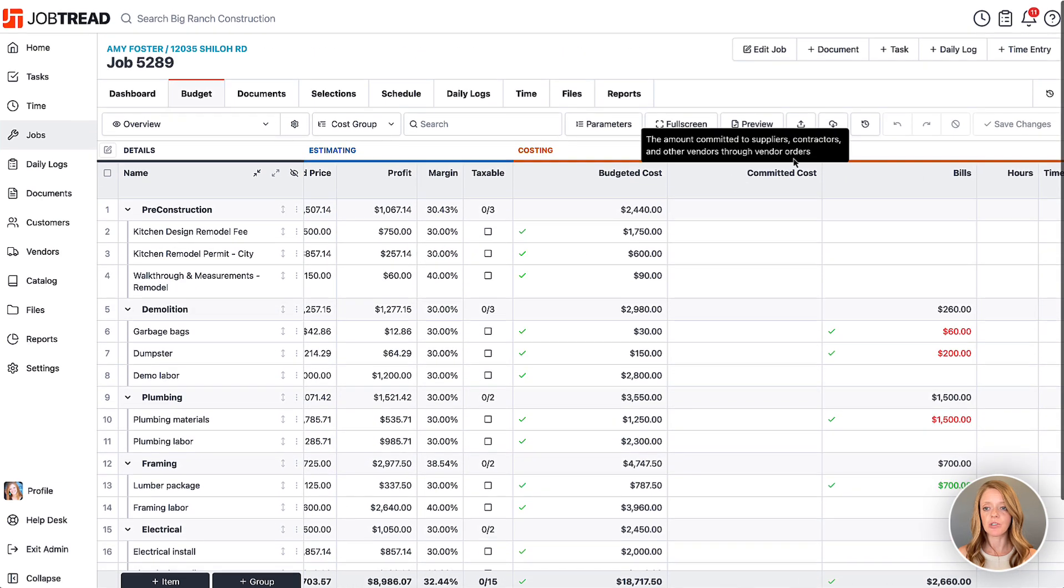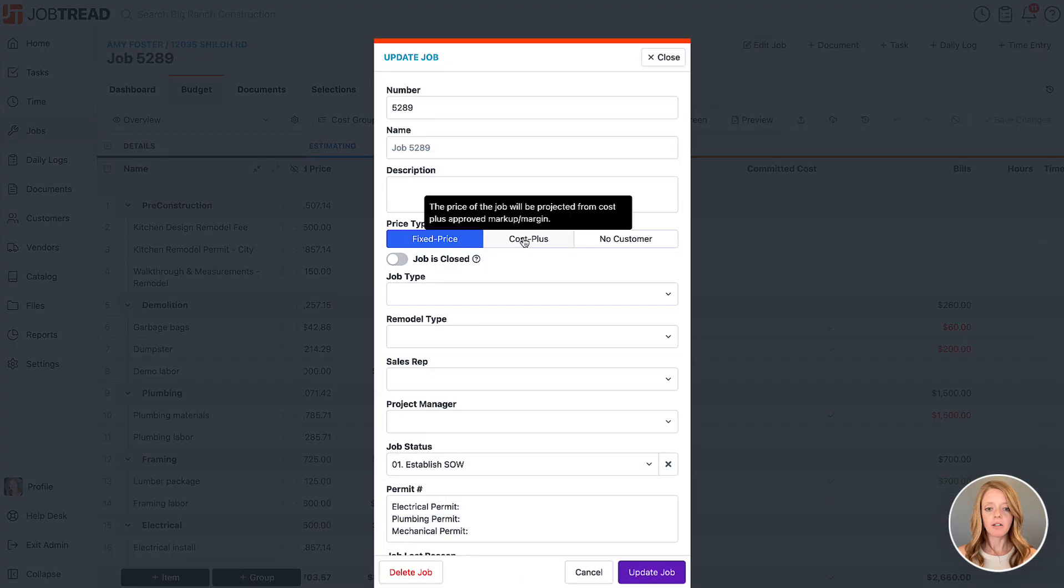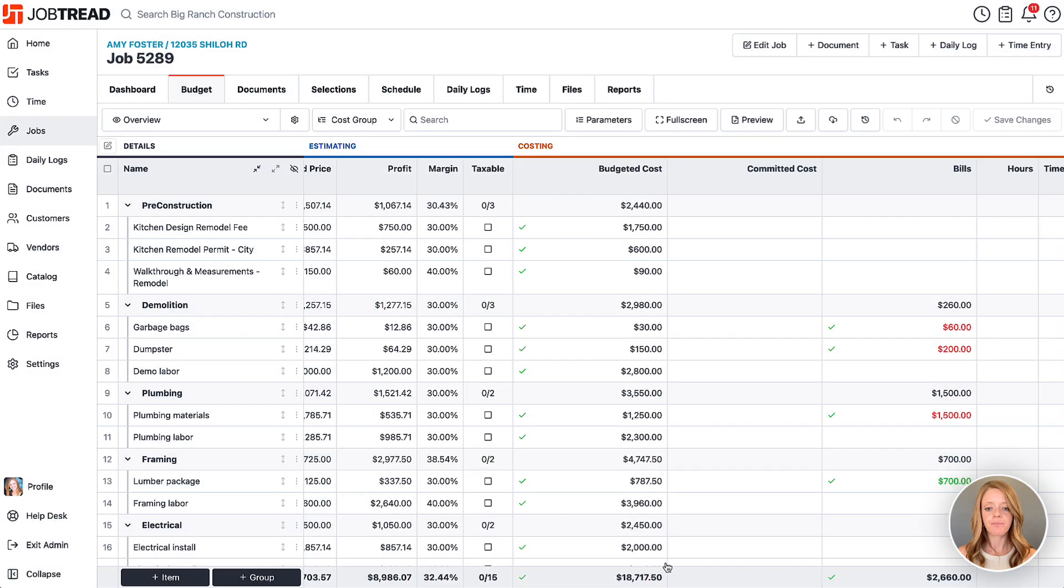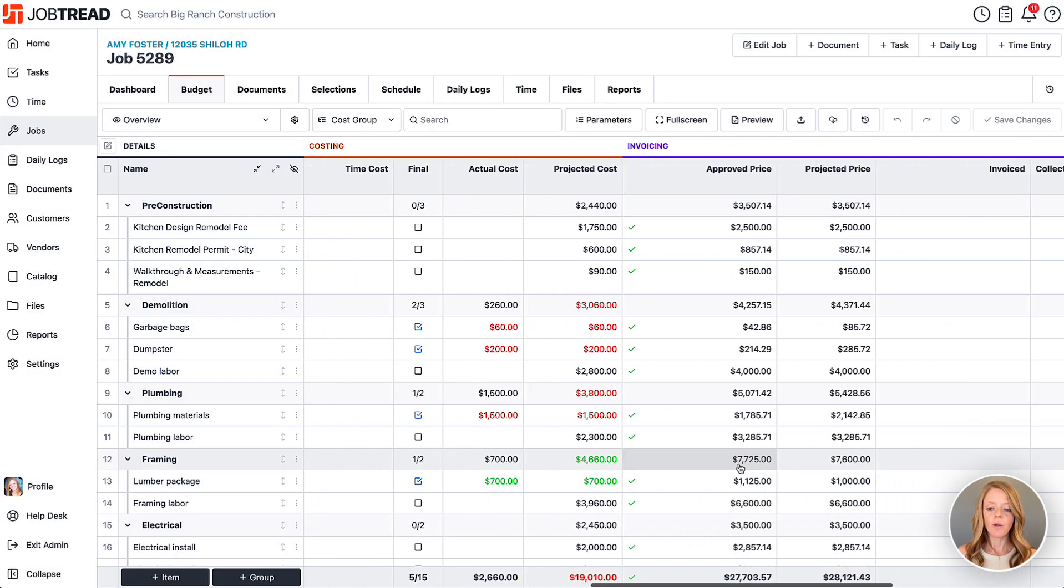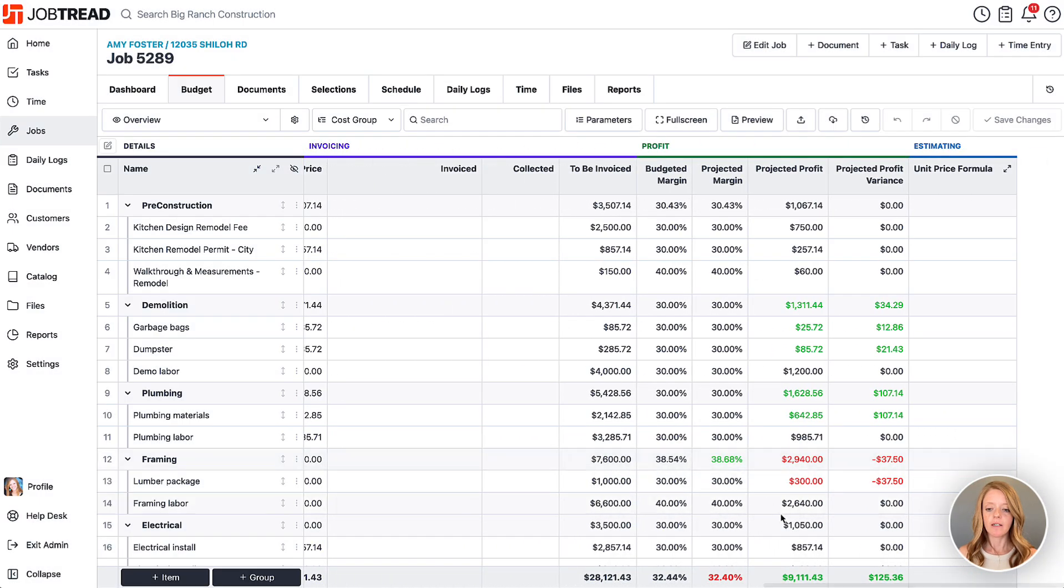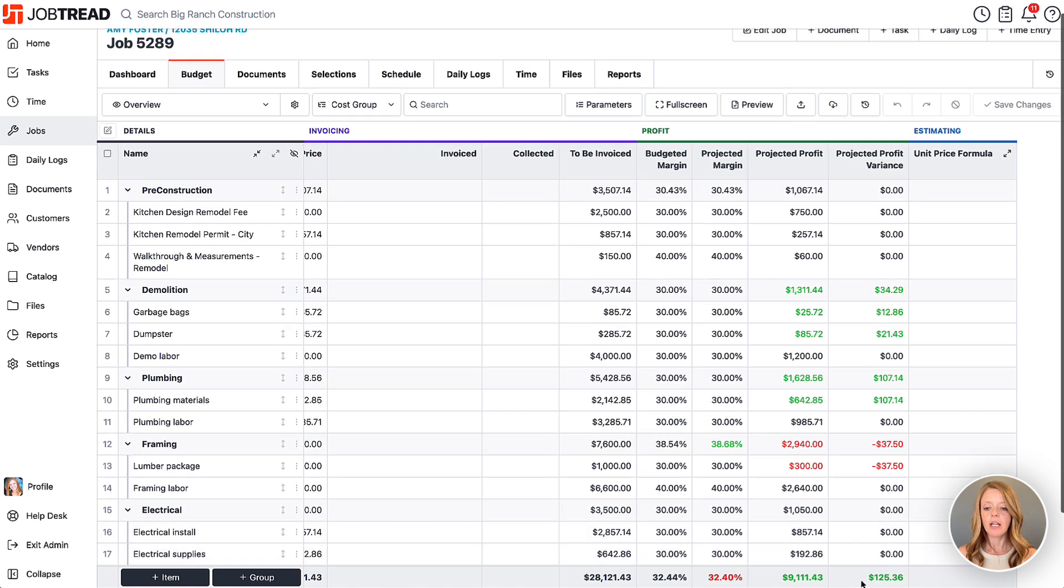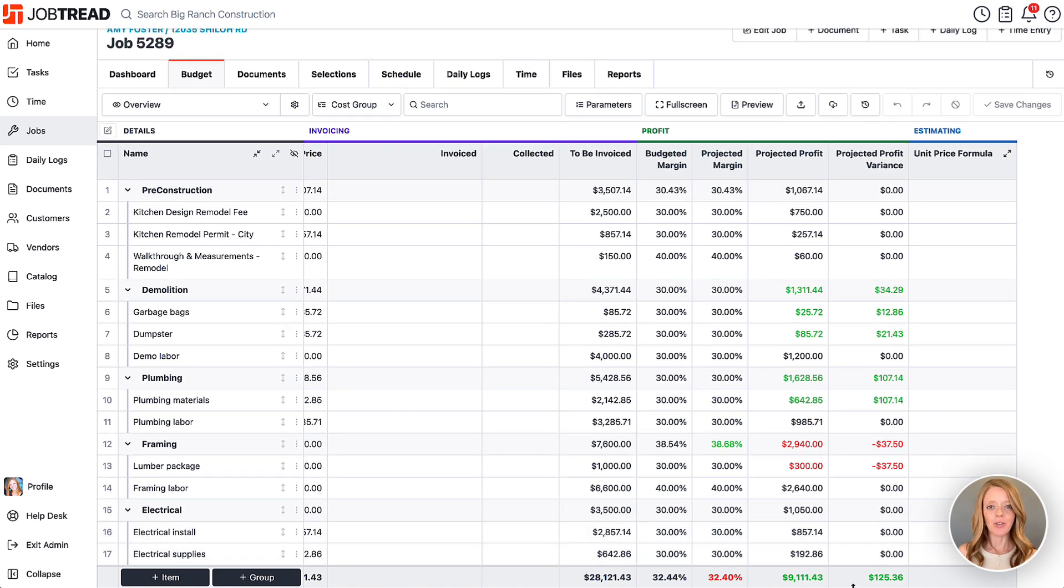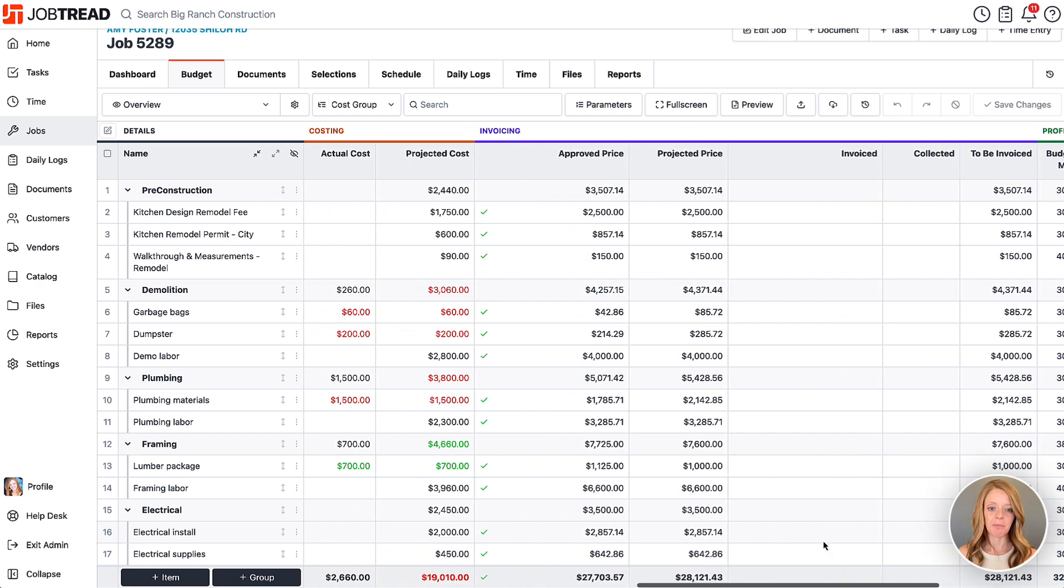I'm going to click edit job, cost plus, update job. Now it's still going to be showing us the difference. However, we are adding profit because we have the overage, so therefore we're not necessarily in the red for our variance. Instead we're just going to be tacking on additional dollars and that will update once we do our invoicing.